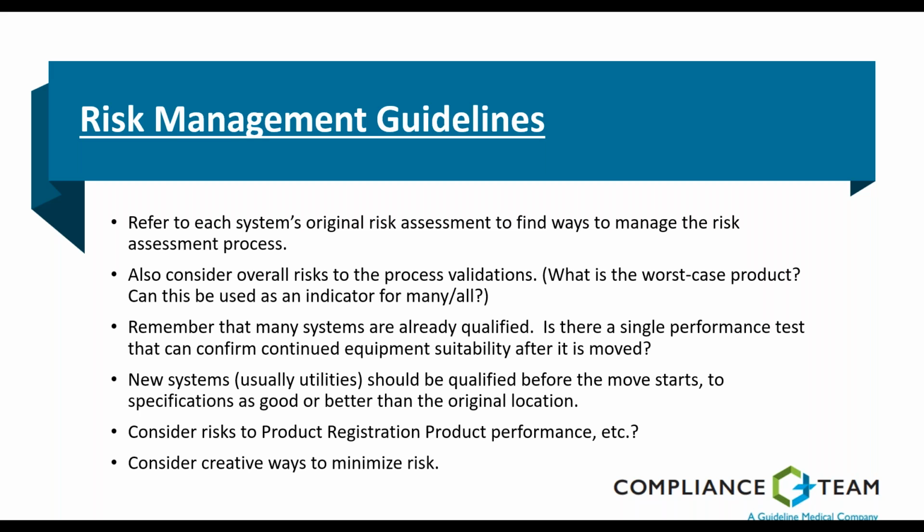You're going to be using a brand new HVAC system. Normally, you would qualify that HVAC system before you start moving any equipment into the room. So that's a prerequisite that you would consider in your plan. It's also a big risk that gets mitigated up front.